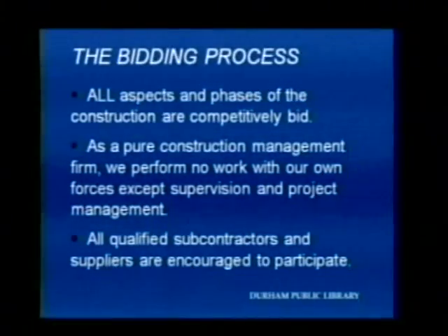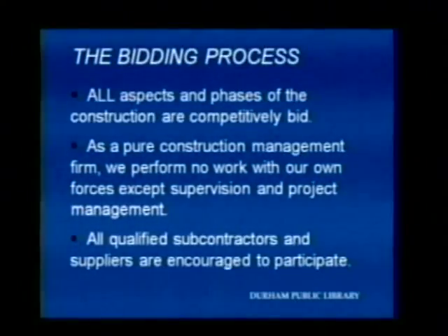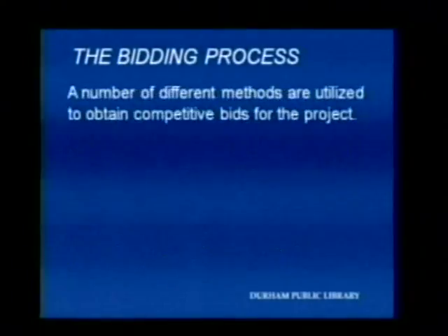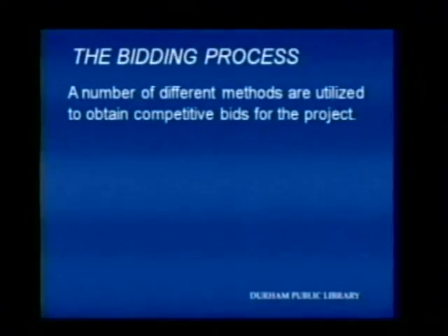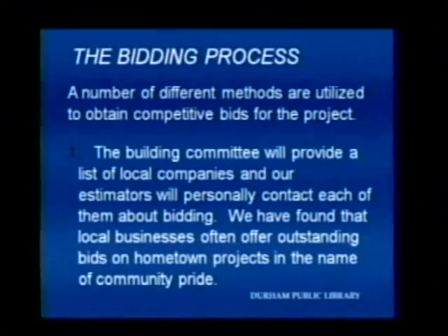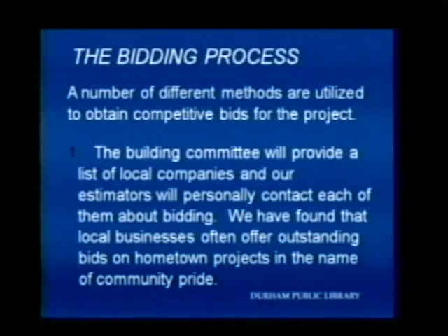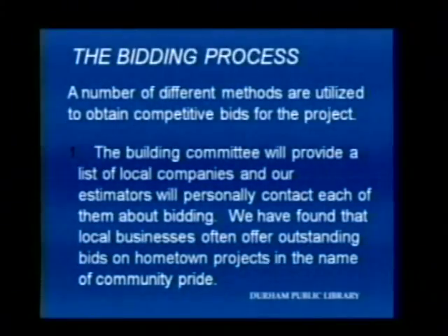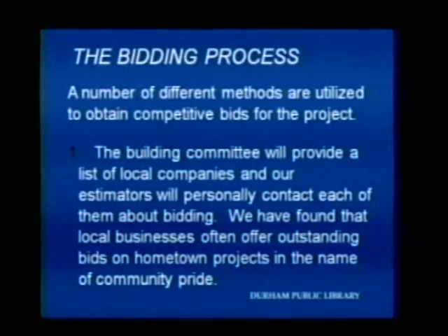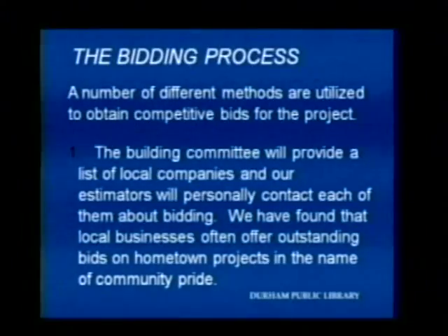During the bidding process, we utilize a number of different methods to get pricing. The first thing we always ask of the building committee of the town we're working in is, please provide us with all the names of companies that are local that you think would like to participate. And then we personally contact every one of them and invite them to submit bids.